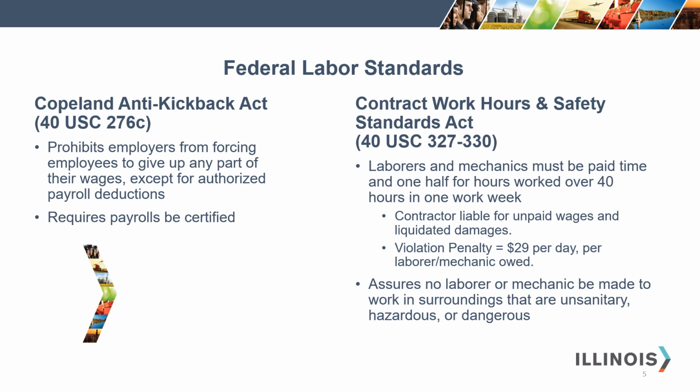The Copeland Anti-Kickback Act prohibits employers from forcing employees to give up any part of their wages, except for authorized payroll deductions, and requires the payrolls to be certified. CWHSSA, or the Contract Work Hours and Safety Standards Act, requires that laborers and mechanics be paid time and a half for hours worked over 40 hours in one work week.